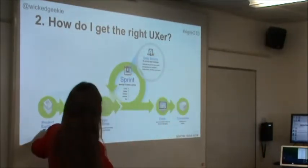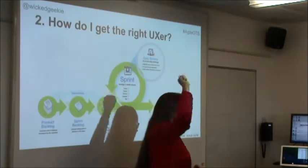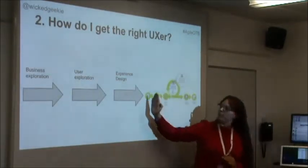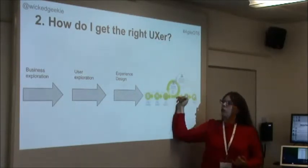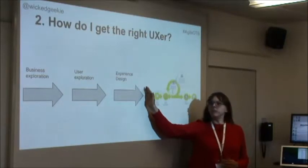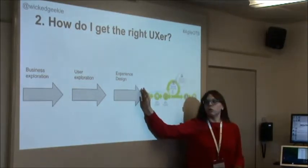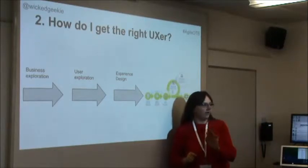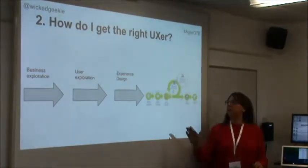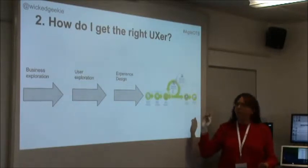Remember the story of Agile: you've got a product backlog, then a sprint backlog, user stories, sprints, demos, deliverables — job done. So where does UX fit in there? Not easily. Because half of the story happens before we get to Agile, before it enters the dev room. One of the massive pitfalls is if anything enters the dev room without having been put through this process first. If the idea is at a 'glint in the CEO's eye' stage, it's going to go horribly wrong. That's the recipe for disaster — it will go in the backlog, in the sprints, there will be delivery, and then it doesn't make any sense.